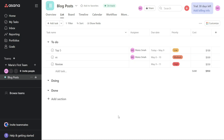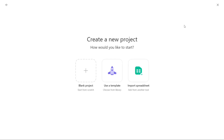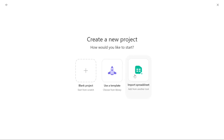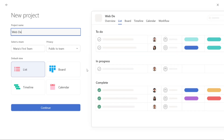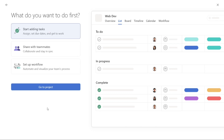Now let's see how to create a new project in Asana. To create a project, you first need to navigate to the top right corner of the screen and click on the Plus button. From there, select Project. You will then see three options: Blank Project, Use a Template, and Import Spreadsheet. To create a project from scratch, choose the Blank Project option. Next, give your project a name and select a view from list, board, timeline, and calendar. The default view for a new project is the list view, but you can easily pick another view that suits your needs. Once you have made your selection, click on Continue.